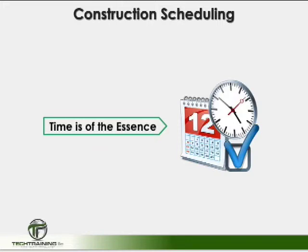Time is of the essence is not just a phrase — it is a contractual agreement, and it comes directly from business contracts. It means if one party fails to complete the contract performance within the specified time in the contract, the other party has the right to sue for breach of contract. This is especially true in the construction industry.